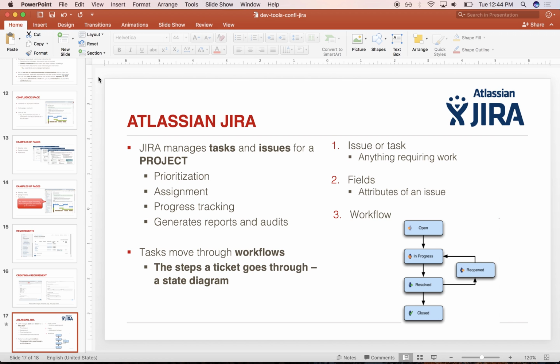Ideally, at the beginning of a sprint, everything is set. You know exactly which stories or issues are going to be worked on that particular sprint, and we don't add anything to that sprint. Ideally, at the beginning of the sprint, everybody votes on what will be the effort of a particular issue, right? And you're playing a game